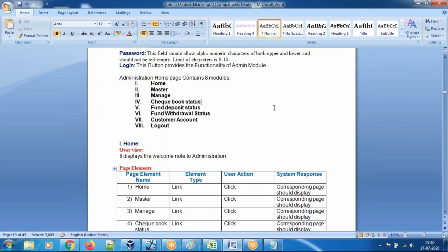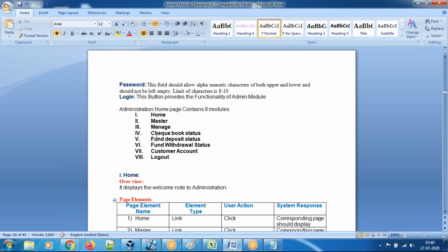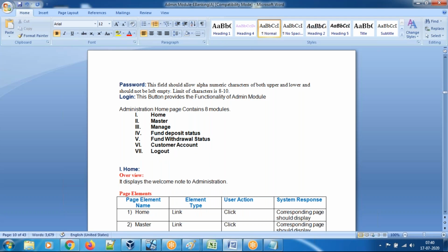For example, what happens if the project manager does not read the document? This is a banking project document. In this, checkbook information is missing, and this project is not reviewed by the project manager properly and it is approved. Once this document is approved, at the next level the developer starts developing the project. In the middle of the project work, the developer gets some doubt. Again, work is stopped there. Why? Because checkbook information is missing, they come back to the project manager. Again, discussion will start. Time waste will be going on.